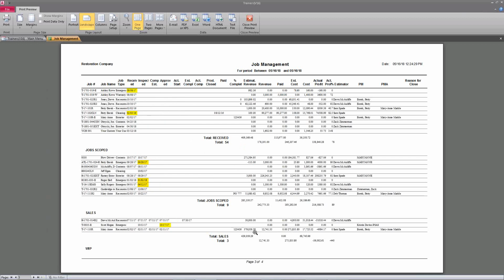As soon as a job is sold, not only do I want the estimated revenue, that's an approved number by someone. They've agreed to pay that. I want it in the system. I want them to assign the gross margin that they're expecting to get so I can see an estimated cost value populate. I want to see on paper that they plan to make money when they've committed the company's resources. Don't accept anything less.